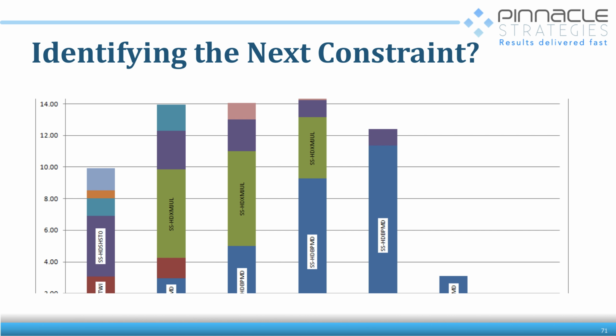So we can make pretty graphs and stuff like that. So we start taking the idea of a bottleneck or constraint resource and we start moving it away from the subjective view of, hey, whose name got called in the last 2 weeks, to here's the real numbers for our process. And again, it doesn't have to be hours, it could be units, it could be dollars. What matters is you pick something that is representative of load to capacity.